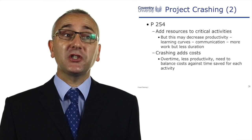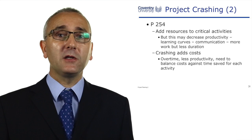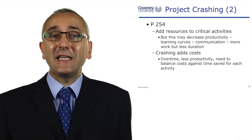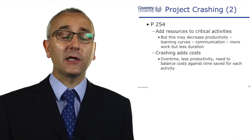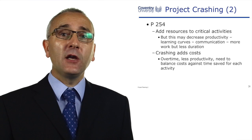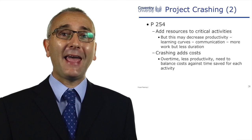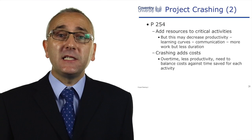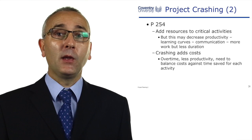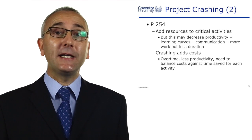Gardner suggests that adding resources might actually decrease productivity. If you put two people on the task, they've got to communicate with each other, which could actually increase the work for the task. An example: you've got 20 hours to deliver a piece of software — 20 hours of effort. Somebody says this is going to take three or four days to complete. The task is on the critical path and we need to speed it up.